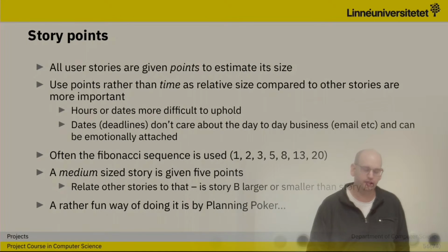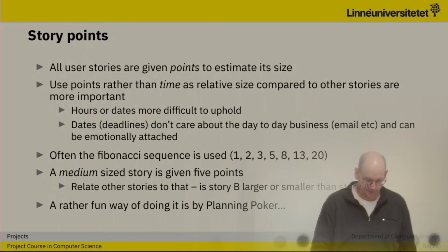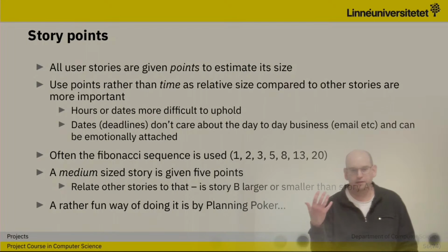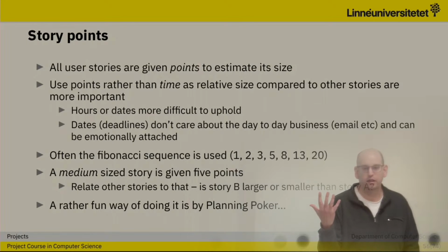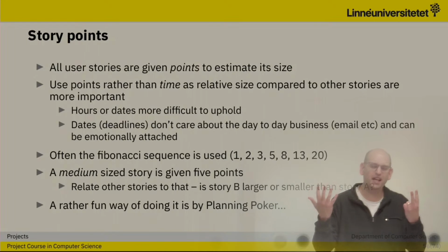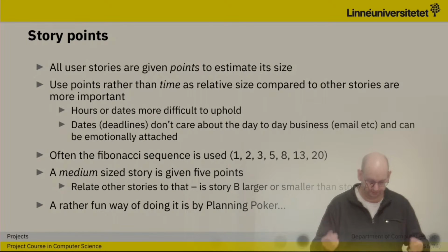So instead of saying that this will take 5 hours to complete, we want you to say that it is a 5 story point story. And that doesn't say very much, really, but a 5 story point user story is more involving and more complicated than a 2 story point, and that is what's important.